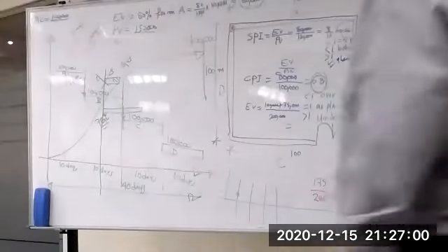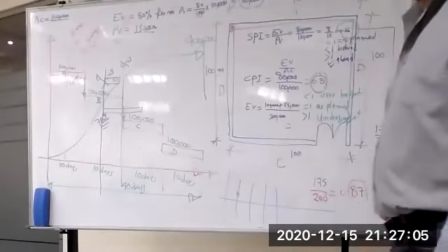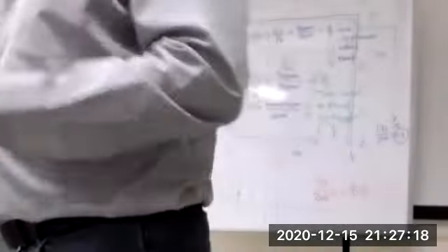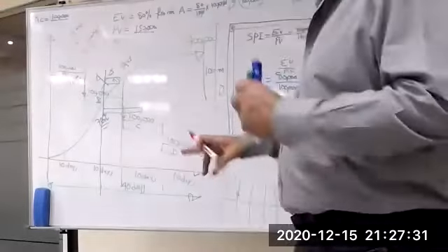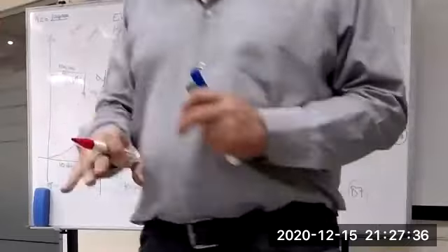Now 0.56 first and then 0.8. Now my corrective action is very effective. Keep going. If the effectiveness of corrective and preventive action is not good because it's still going behind, change the technique. Ask to change the baseline. Ask for another budget, another monitoring, another team. Corrective action every day. Without planned value, earned value, and actual cost, there is no meaning for cost control.